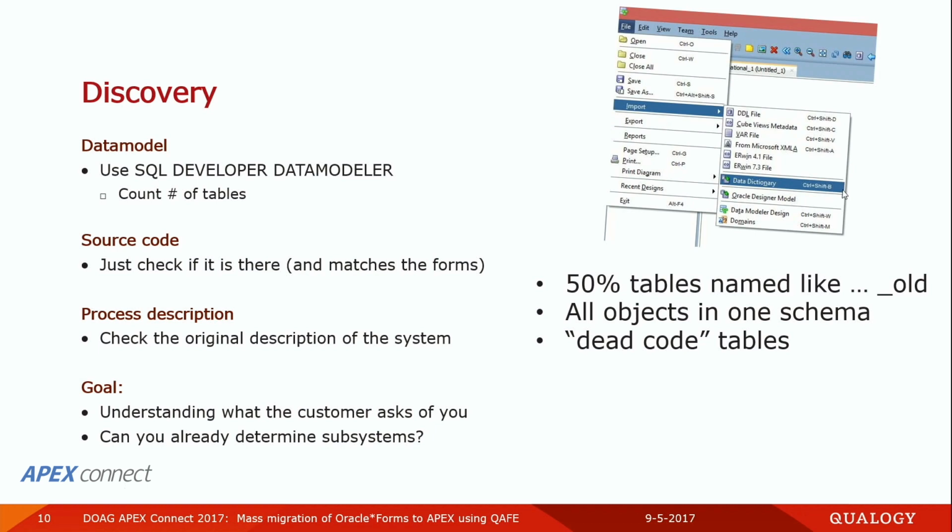And you can ask the users about what's in the table, what kind of data is there, and why is it there? Oh, that's a part of the system we don't use anymore. It's an old telephone system. Why is it there? If you have that, you know that the database is a mess, and you know that the processes, so the company, is making a mess of it, or at least is not trying to correct the mess that is in the database.